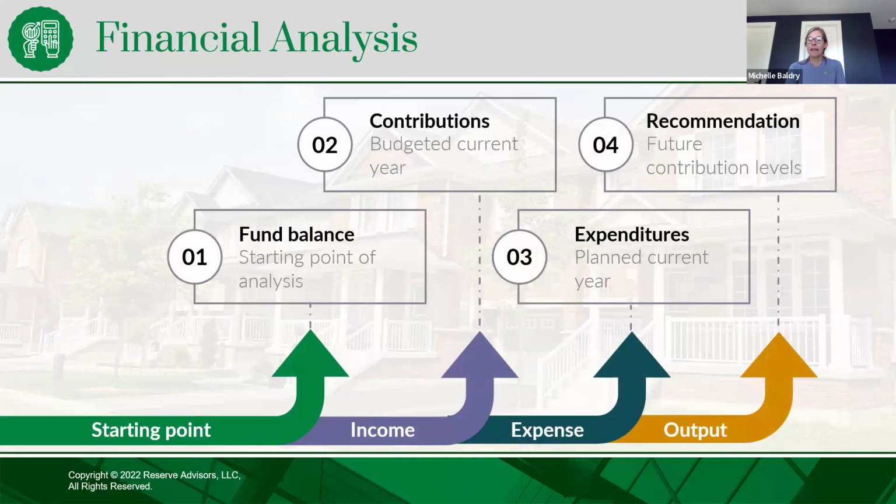So after we've had that inspection or that physical evaluation and we've developed the 30-year roadmap of expenditures, the next step is really that financial analysis. How are we going to pay for it? So reserve study is a snapshot in time. You're going to provide us that starting reserve balance. So as of today, how much do you have in reserves? What is your current year budgeted contribution? Like I said, we're not going to recommend changing contributions this year. So what have you budgeted for this year?